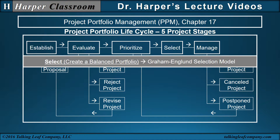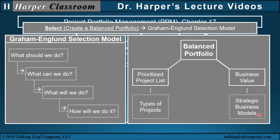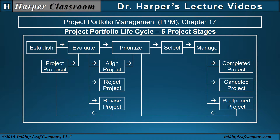The select stage. Create a balanced portfolio. Wysocki suggests the Graham-England selection model. In this select stage, a balanced portfolio refers to a balance between the prioritized project list, prioritized according to the types of project and the funding allocations, and the business value indicated in the strategic business models from the established stage. The Graham-England selection model is used to balance the portfolio through the steps of what should we do, what can we do, what will we do, and how will we do it. The output of this selection stage is the final portfolio for implementation. And that moves us to the manage stage.